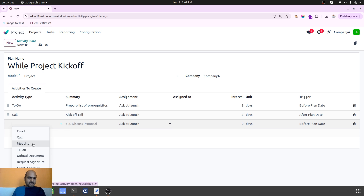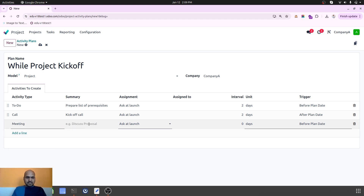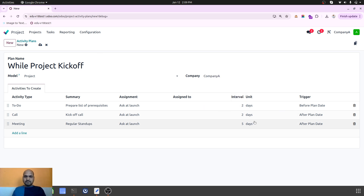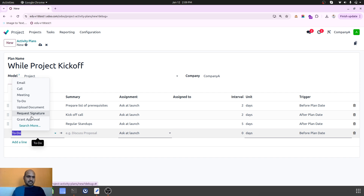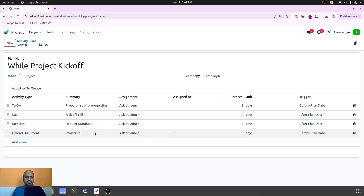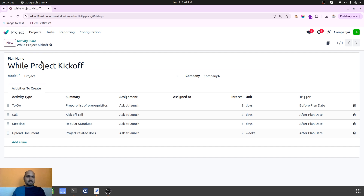Then I want to plan a kickoff call after two days of the plan date. After that, I want to plan a meeting for regular stand-ups, which will be after five days of the plan date. Here we cannot set recurrence, but we can set days, weeks, or months. Then I want to add one more item — 'Upload Document' for project-related docs — after two weeks of the plan date. This is how I have planned the project kickoff activity plan.